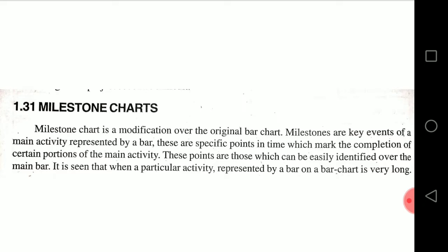Although there are certain limitations of milestones, though controlling can be better achieved with the help of a milestone chart, still it possesses the same deficiency as the bar chart, that is, the interdependencies between the milestones are not shown. So here also there is no case of interdependencies or interrelated linkings.